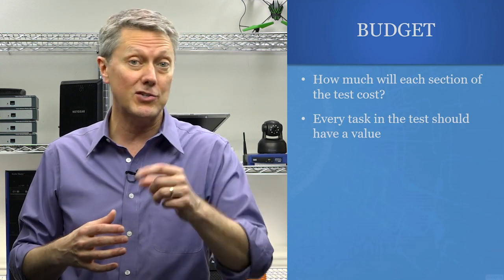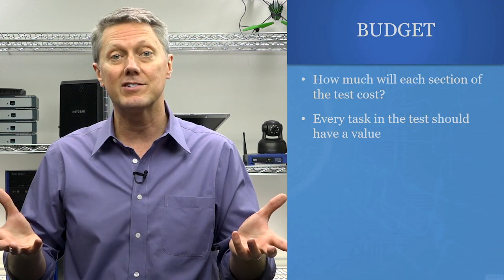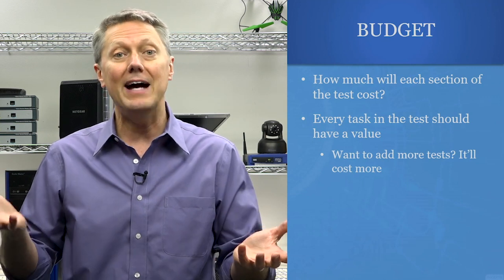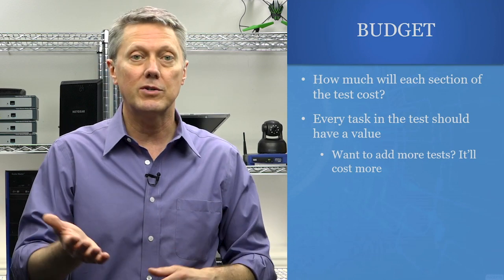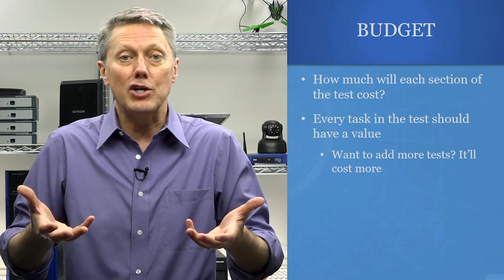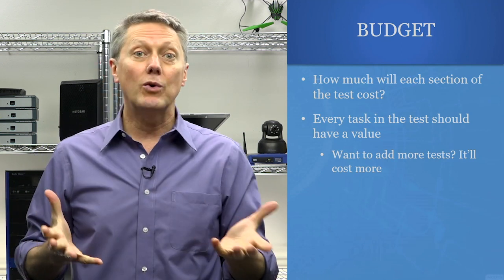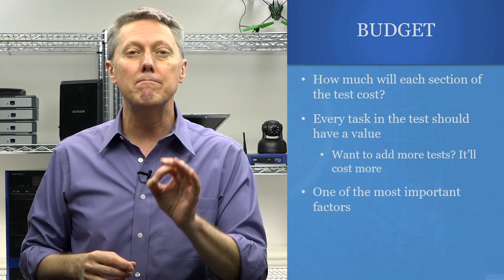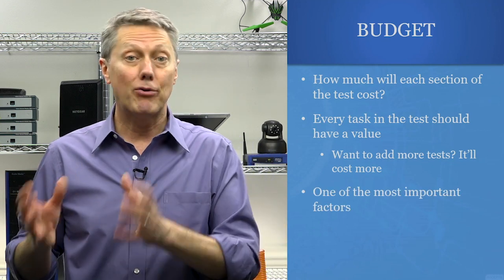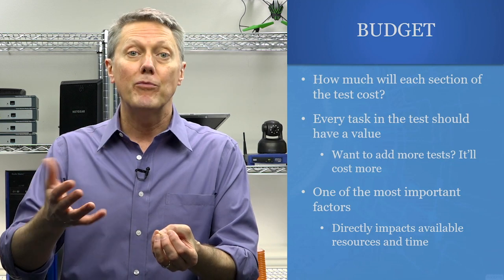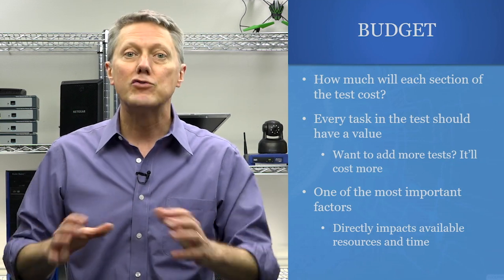Your client may come back — and we talked about scope creep earlier — asking for more tests. You can easily say yes, but it's going to cost this much more money, and then ask if it's worth it. If they say sure, do the extra tests, we'll pay for it, then you can increase the budget based on the new scope. It's very important to manage that scope because it's very tightly tied to budget. In fact, budget is probably one of the most important aspects of an entire penetration testing project. If you don't control the budget, you'll end up going over budget or giving away time for free — you never want to do that. Make sure you look at budget within the context of all of your plans and understand how much everything costs throughout the entire project plan.